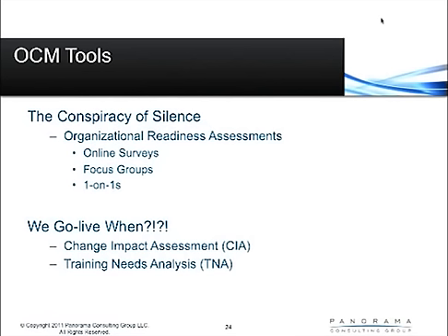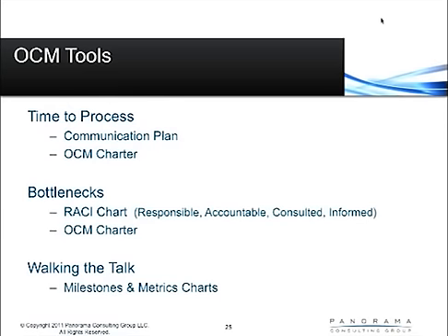So that's one tripping point that a lot of companies struggle with, and that, quite frankly, is why so many companies go over budget and spend more time than expected. They expect that the initial proposal they got from the sales rep was accurate and that's going to be the final answer, and that's what they ask for when they go to the board. Then as they get into things, they realize maybe that was overly optimistic, and now we've got this bigger bread box to deal with. So those two tools are very important in alleviating some of those uncertainties and risks.